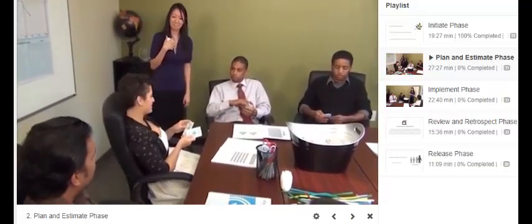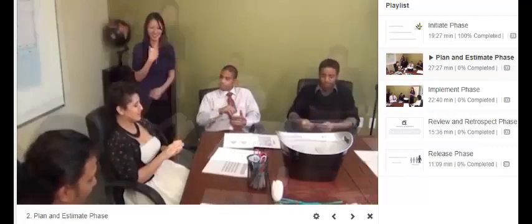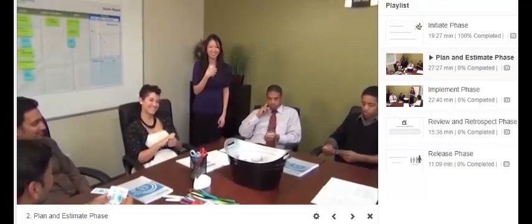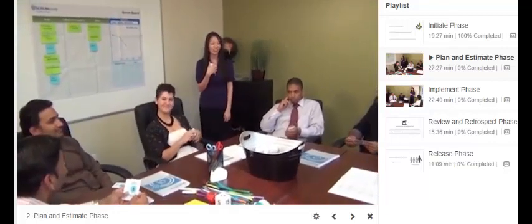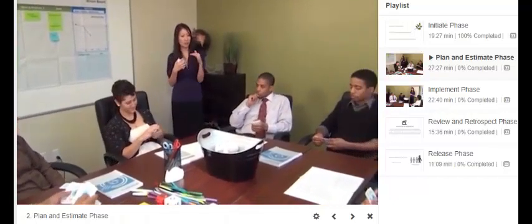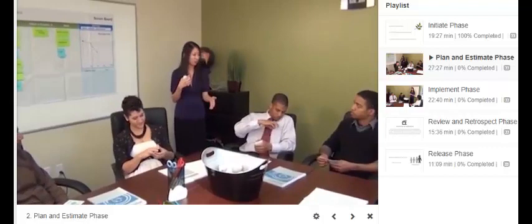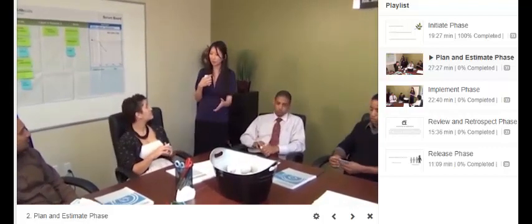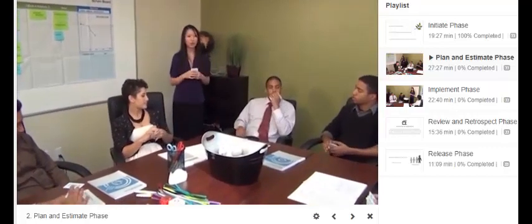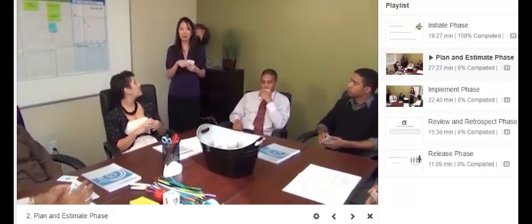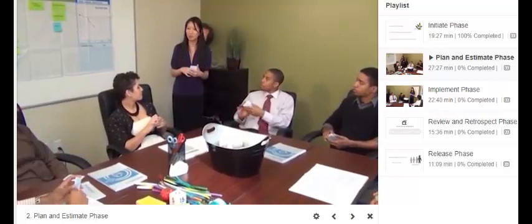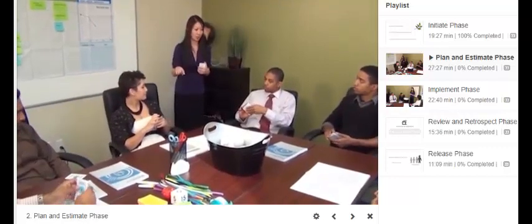Now the instructor goes back to the person who chose the lowest number. The participants with the lowest and highest estimates have to convince each other as to why they assigned their respective numbers. So the way this works, you have an opportunity for the folks who guessed on the high end and the folks who chose the low end to explain why, as a means to convince each other. And if you think about it that way, it makes sense. Then perhaps that would change the minds of the other people on the team, and then you do another round of the estimation.